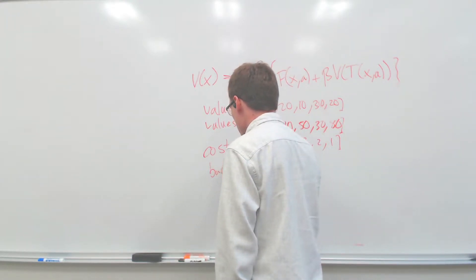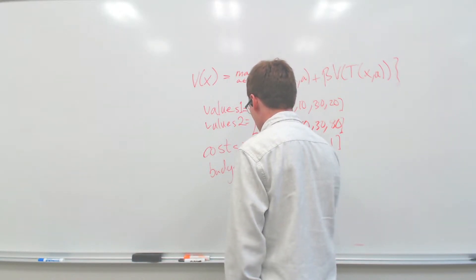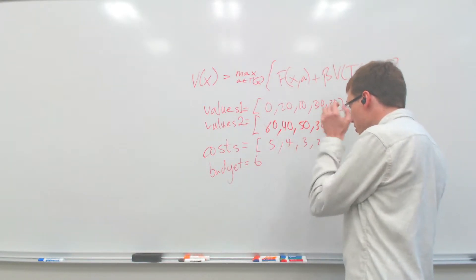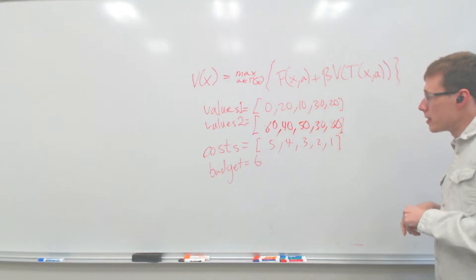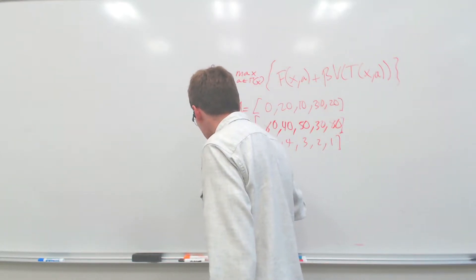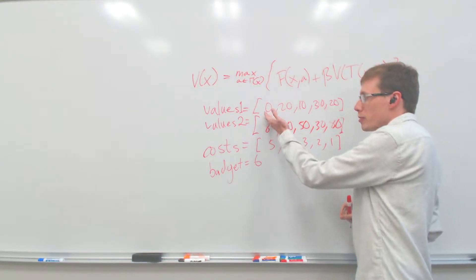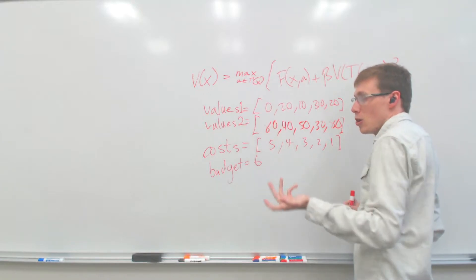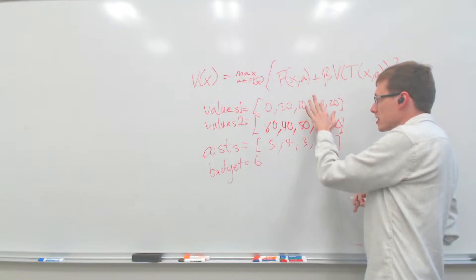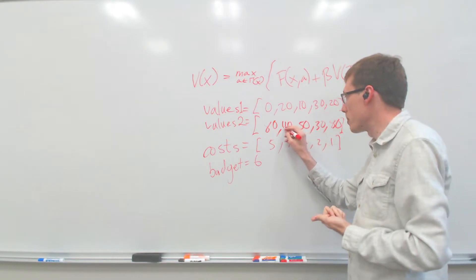With 6 budget to allocate, you can do various combinations of these projects. But the idea is that these are uncertain projects — although you can fund them, you don't know how much they'll actually pay off. For example, there's a 50% chance one pays off zero or 80 — it could be a lot or a little. Another is more certain, essentially a guaranteed third. This is the uncertainty in how much these things will pay off if you fund them.